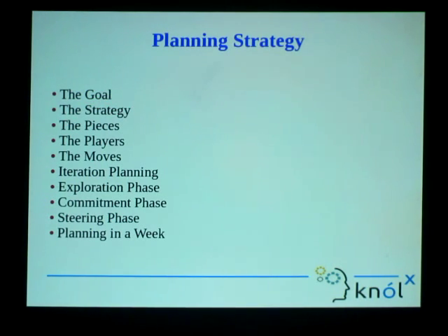Then, according to the goal, the strategy is made. Okay, that right now, in this particular release cycle, we need to give the withdrawal feature here for this bank. Then, according to that, we make strategies. For example, how many developers we need for this release cycle, what their expertise should be, and how much time it will take to build this feature, and other factors. So a strategy is made according to the goal.